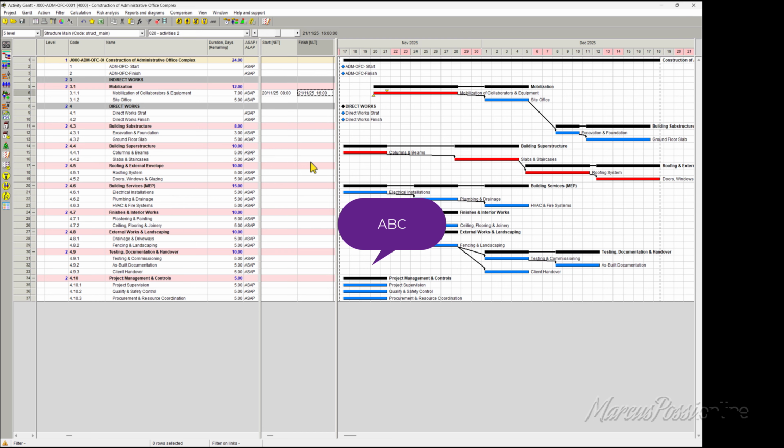Okay, Joseph? I've seen you using the web to do the linking, but there are some activities that you don't have to finish before you commence somewhere. Let's say the earthworks. I'm doing the sub base. I don't need to finish 100 kilometers of sub base before I do the base. I can do maybe 300 meters of sub base and then commence the base. But if you drag the web, it comes to the beginning. Can't it show that I didn't complete everything, but I'm starting from the middle?